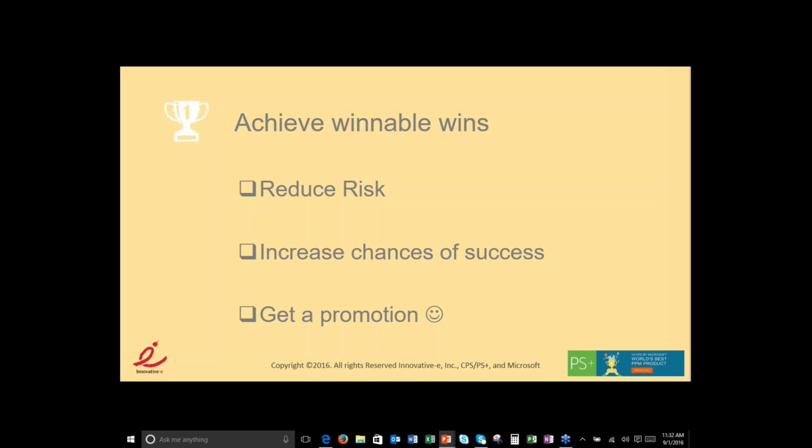It may not seem intuitive, but I'll throw one of them out there, for those who have tried this before and have failed miserably: one of the dimensions that's very hard to do is very detailed resource management. The reason is that when you're talking resource management, oftentimes you're tying into a lot of other processes, and you're touching a lot of people. So you're talking about having all your team members do time reporting or time sheeting, and if they're doing software development or other types of product development, they may already have ways that they're tracking their work, and they have multiple ways to track their work.